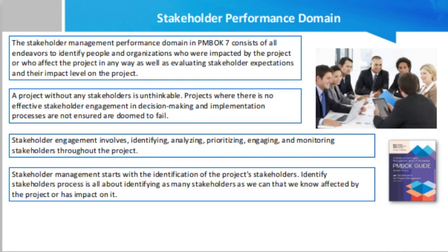Although stakeholder management may seem easy on paper, it is one of the most difficult responsibilities that the project manager has to fulfill, because in most projects the project manager does not have authority over stakeholders. A project manager cannot manage people and organizations that are not even in his or her organization and do not report to him or her. Because he or she is not a designated stakeholder manager, the project manager manages only stakeholder engagement, not stakeholders. This is also a core part of the project integration endeavor.